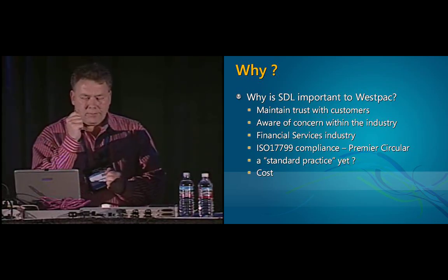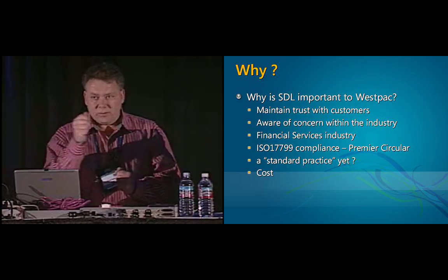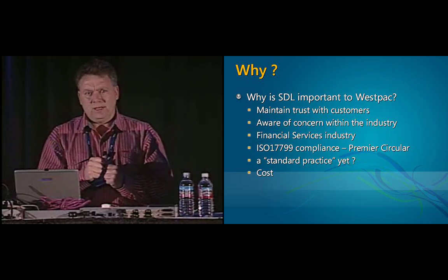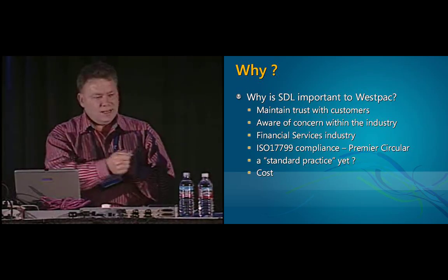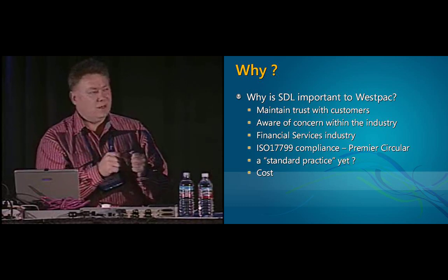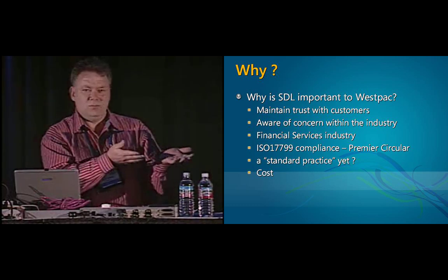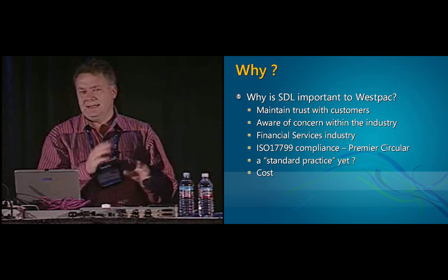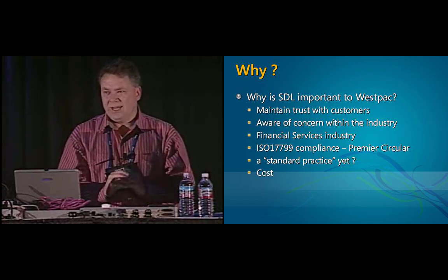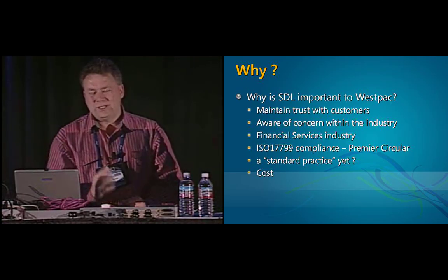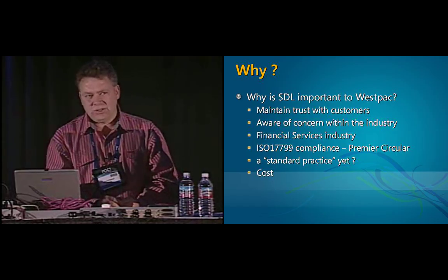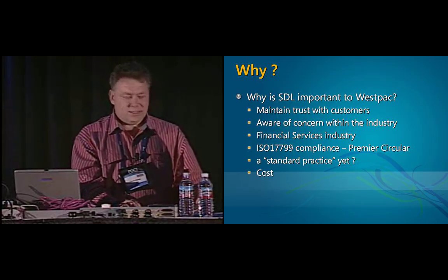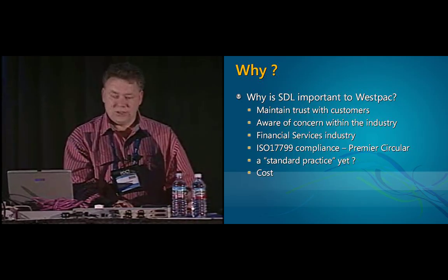Because it's like at the end of the project, someone coming up, and I think it was Keith Brown on Monday, saying, "Okay, the application's in. Just turn the security switch on now, will you?" And you go, "Huh, what? What security switch? It wasn't implemented in the project plan." And then you have to go back and do all your hacking and modifications to implement security, and then the security is not woven into the application as well as it should be. So we are hoping to make savings by putting the security in up front.